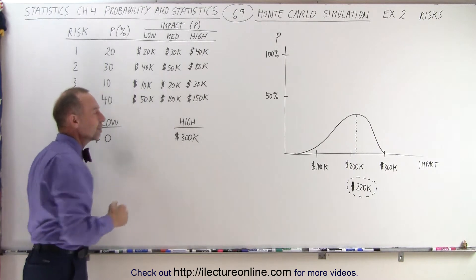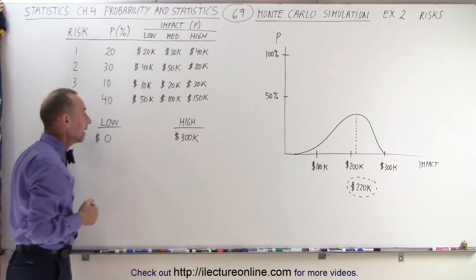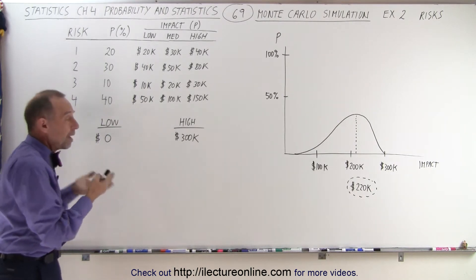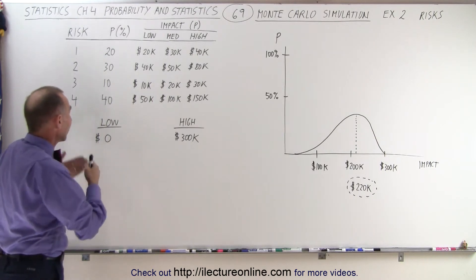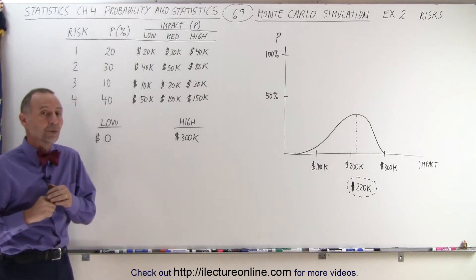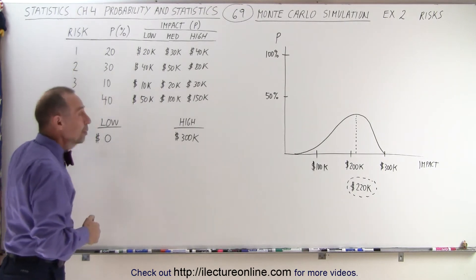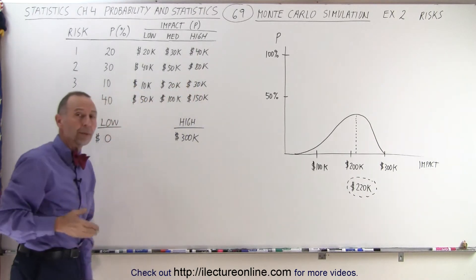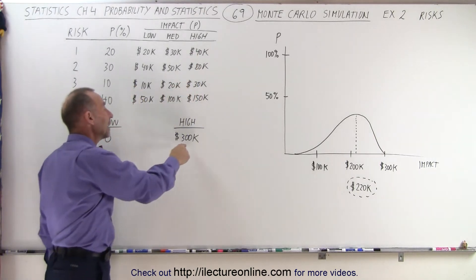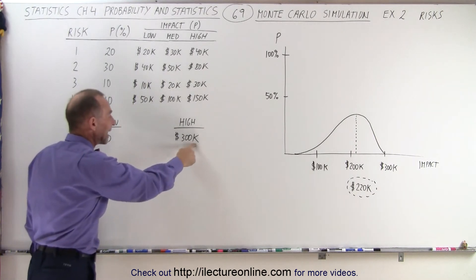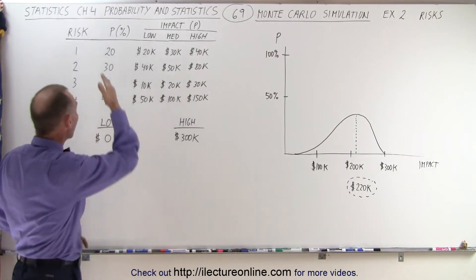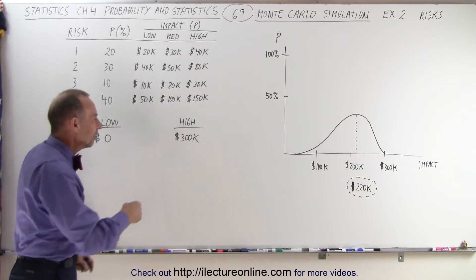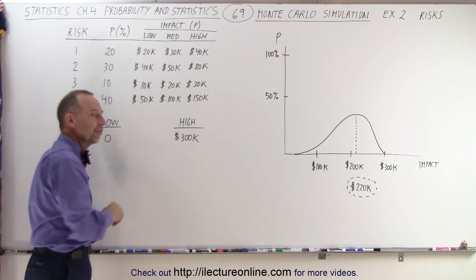We have a low estimate, a medium, and a high estimate for each of the risks, and a probability of what we think might happen when it occurs. Now, it's possible that none of the risks materialize, in which case there'll be zero additional cost to the program. But there's also a possibility that all of the risks materialize at the highest predicted cost, meaning the project would cost an additional $300,000. K stands for a thousand, so that would be $300,000 if all risks materialize at the maximum estimate. Of course, this is a very unlikely scenario.